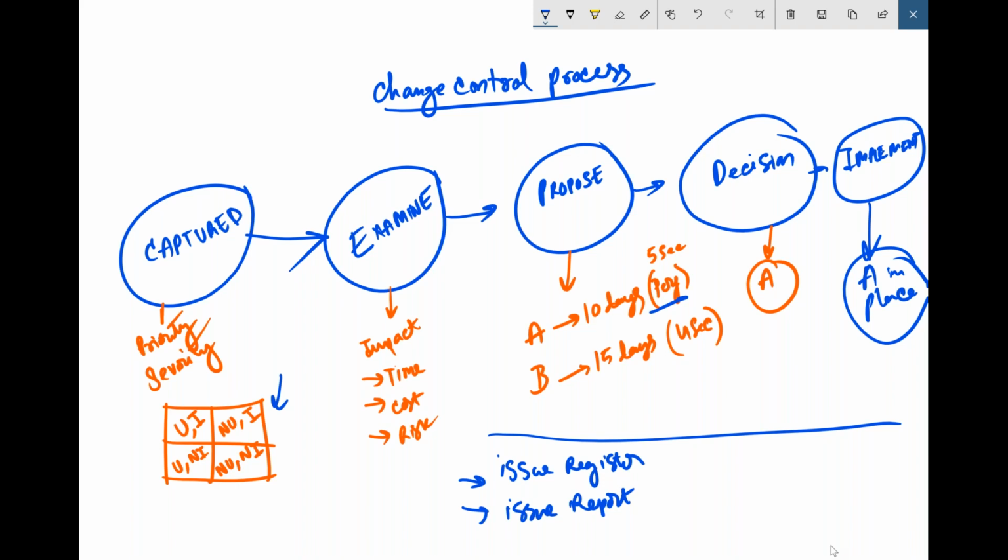And there are some other management products also, like we discussed earlier, configuration item and configuration management strategy. These are the things related to configuration. And there is another thing which a lot of project managers use in order to note changes on a daily basis, called the daily log. And product status account basically contains the updated versions of the documents once changes have been incorporated. So these are the 6 management products which map to the change control process.